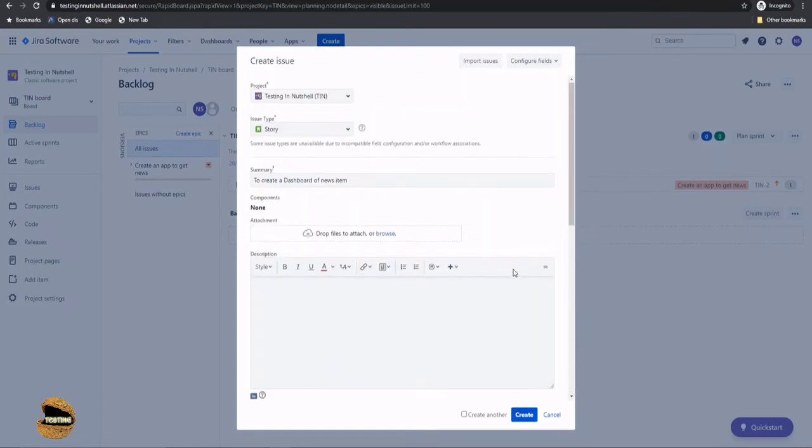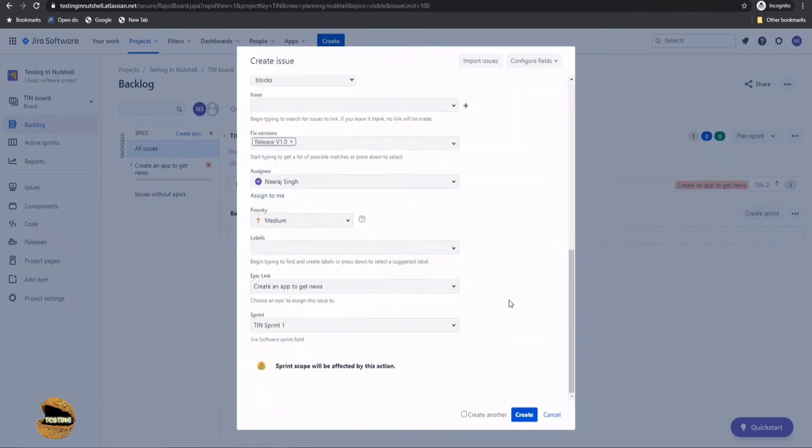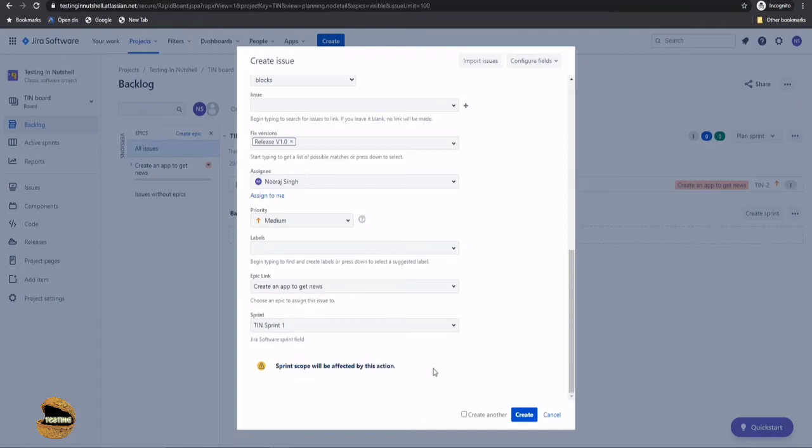So as you're adding the task after creating the sprint, this message will be displayed that sprint scope will be affected by this action. The reason is you may have different estimates for each task or user story which you're creating, and your sprint is already estimated. Your epic is already estimated. So of course, you need to figure out things that will happen within that or not. So Jira is very much compatible with those things.